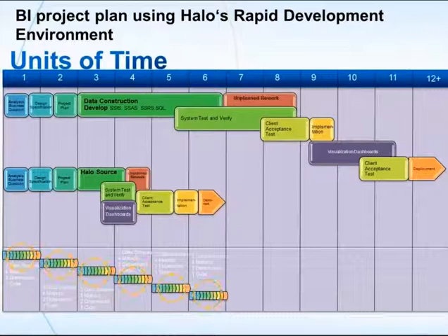What ends up happening is that there are ways that we can use agile development to reduce that cost even more. And this is where a lot of your ROI is going to come in. If instead of using a traditional waterfall method, you use an agile method, you can start to do sprints, whether they're a month long or a week long. It depends on how agile your team really is. And if they can start to put out dashboards immediately that can be used to change your business processes and start to generate revenue, if that's your key indicator, sooner, then you can start to pay back your investment while you're in the development phase.